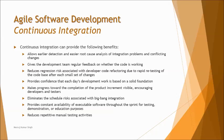CI makes progress toward the completion of the product increment visible — it is traceable, trackable, and monitorable. It eliminates the schedule risk associated with big bang integrations. It provides constant availability of the executable software throughout the sprint for testing, demonstration, and education purposes. It also reduces repetitive manual testing activity because all major complicated tasks are being automated.